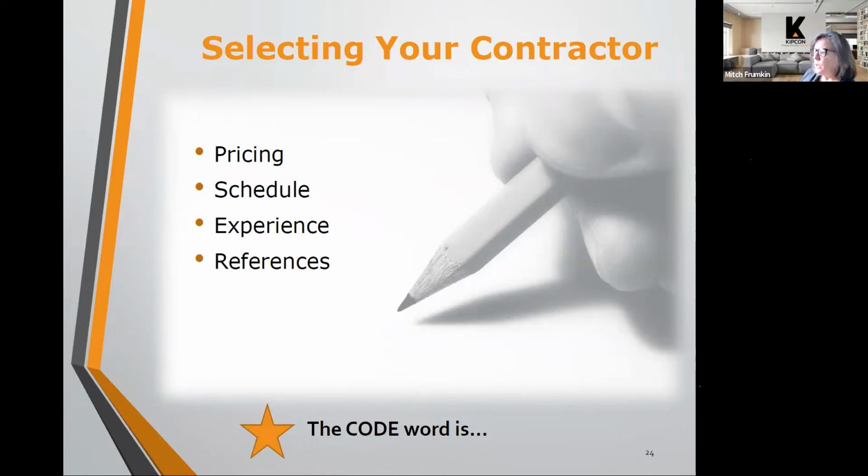Permits, I will tell you, are in the purview of the contractor. It is the contractor's responsibility to obtain any permits they would need for the work that is specified in the contract. For residential roadways, in my experience, permits are not required. There've been very few cases where the actual asphalt requires any kind of permit.